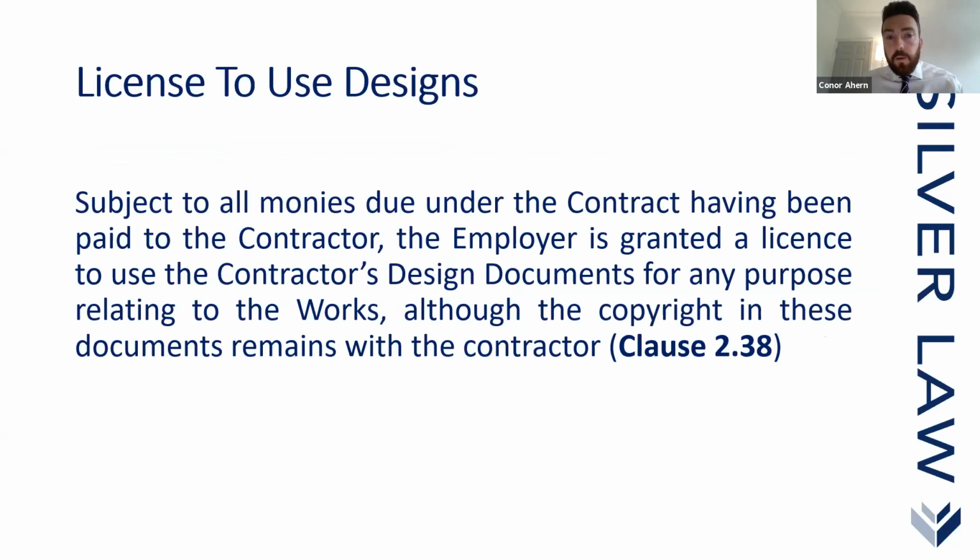So another area in relation to design is actually a license to use and the area of copyright. Subject to all monies due under the contract having been paid to the contractor, the employer is granted a license to use the contractor's design documents for any purpose relating to the works, although the copyright in such documents remains with the contractor. That's clause 2.38.